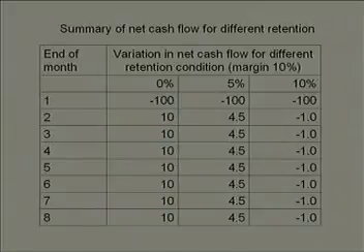So, this is what I want you to notice, that higher the retention value, adverse is the impact on the contractor's cash flow. So, in a project if there is no retention, it is a very happy situation for the contractor.